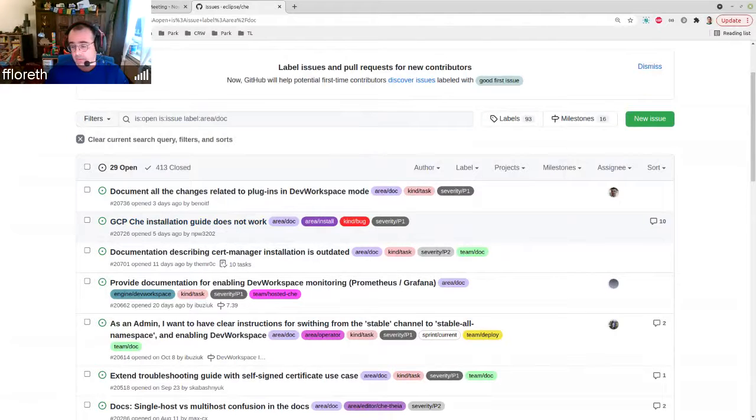We lag a lot behind, so we have a backlog full of tasks from the downstream epic. It means that when a task enters our radar, that's when it's in the downstream epic, and given our lead time to produce the docs, it's too late. So that's our problem. We are always too late because we see things happening too late.